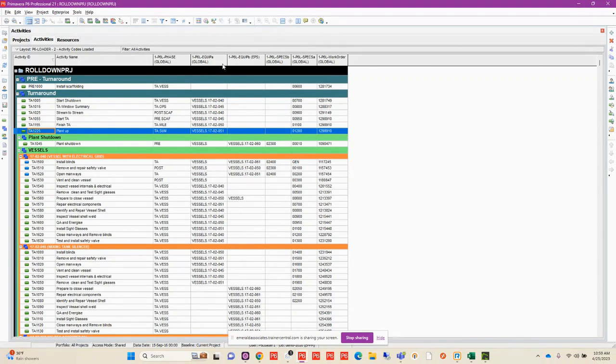So I can combine these two and put it at the level where I want it, and in this case, I am going to take it to the EPS level. I've got the same going on with my specs. I have duplicate lists here, but they're both assigned, so I want to combine those. And these are only important at my project level. And then my work order is a code that is only going to be important to this project. We don't normally reuse work order numbers from project to project, so I want to push that down as well.